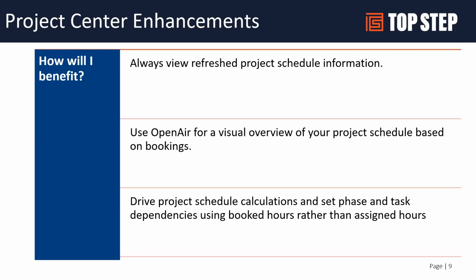And then if you're doing more complex project planning within OpenAir and setting dependencies on the tasks, you can then use those booked hours to drive your project schedule. So beyond just going through and updating your booked hours on the project, by setting those dependencies, you can really drive that schedule and have everything be driven off of those bookings within the system.